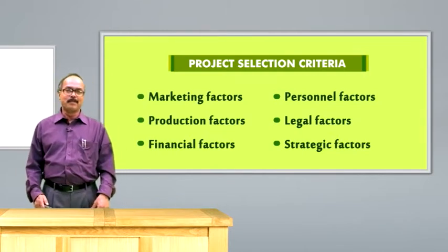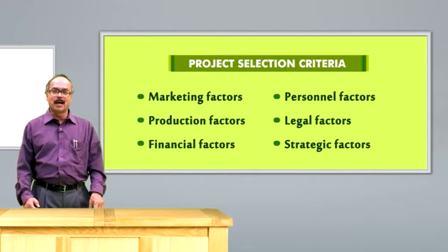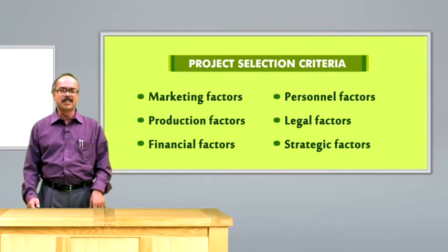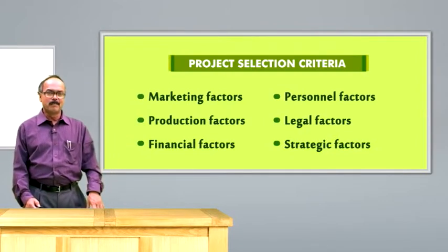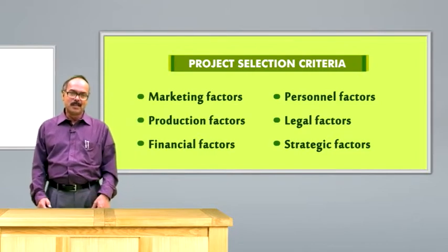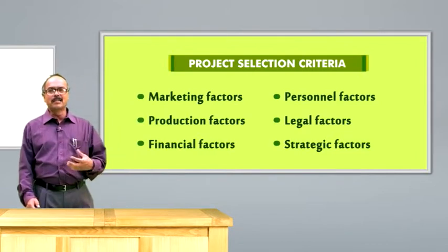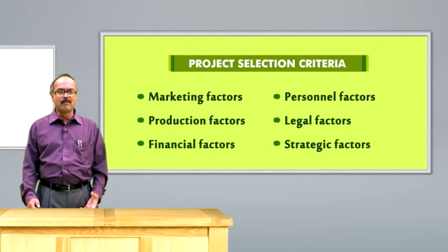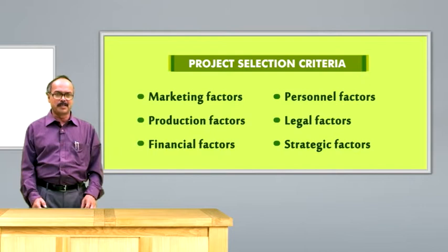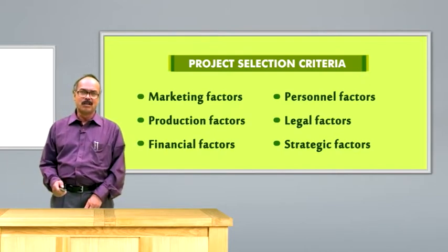Cost of the project and means of sources, impact on current financial position of the firm, profitability in terms of profit margins and returns on investment, payback period, time period to reach the break-even point, and working capital needs. The higher the time required to reach the break-even point, the lesser will be the prospect for higher and desired return. Working capital needs already told.